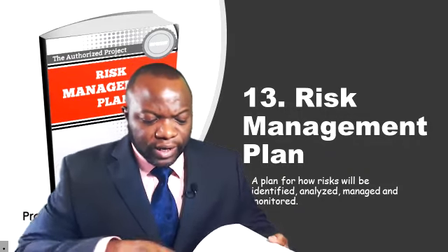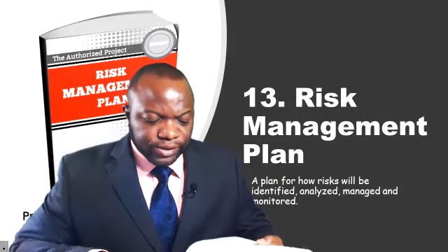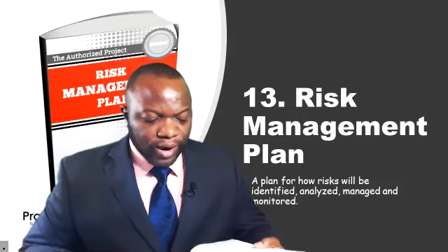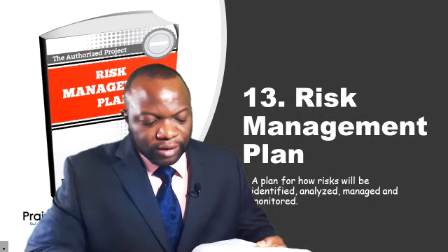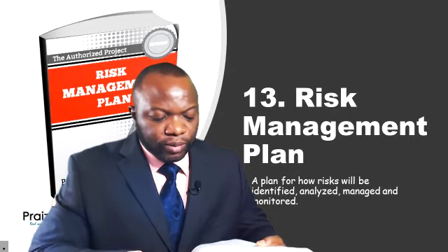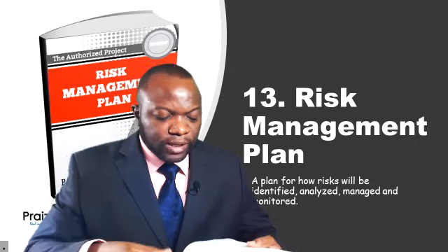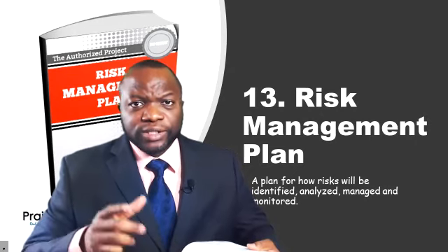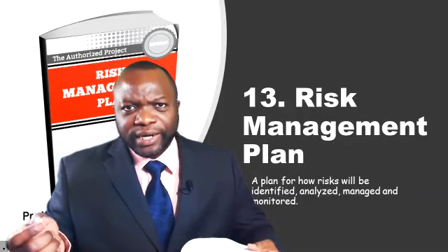It says the risk appetites of key stakeholders on the project are recorded in the risk management plan as they inform the details of the plan risk management process. In particular, stakeholder risk appetite should be expressed as measurable risk thresholds around each project objective. Watch this. These thresholds will determine the acceptable level of overall project risk exposure, and they are also used to inform the definitions of probabilities and impacts to be used when assessing and prioritizing individual project risks. In other words, the acceptable level of overall project risk exposure that a stakeholder is willing to take on to get fed, to pursue the opportunity, to be satisfied. So you've got to link the appetite to the opportunity.